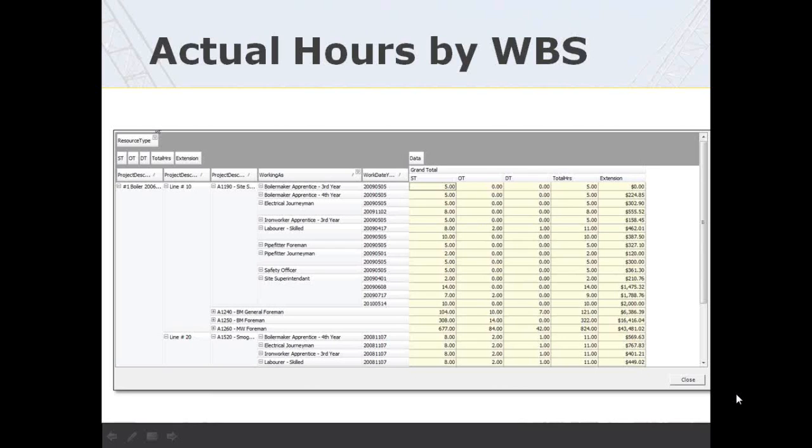It's a typical approach we see when the two WBSs are in sync. So when Primavera is updating DTC on a regular basis from a work breakdown structure perspective, then we may do the inception to date export of hours, so that if any of those changes are synchronized, we don't get outdated hours in the system. As the schedule changes, it will be reflected in both systems.